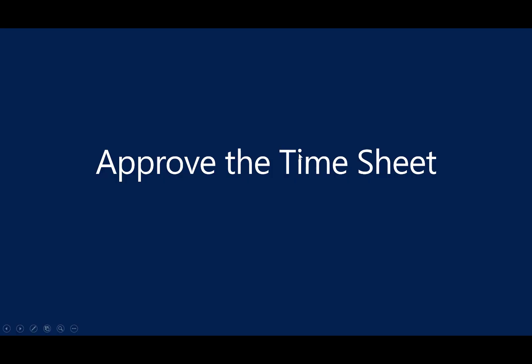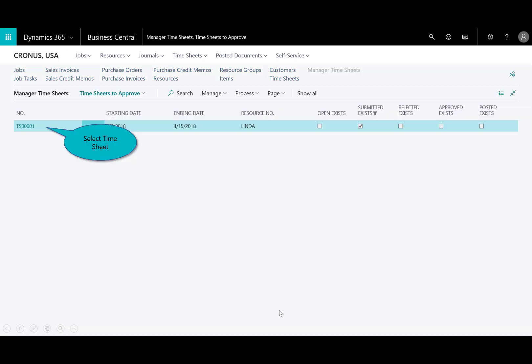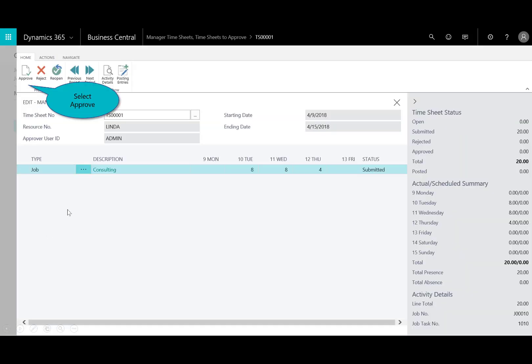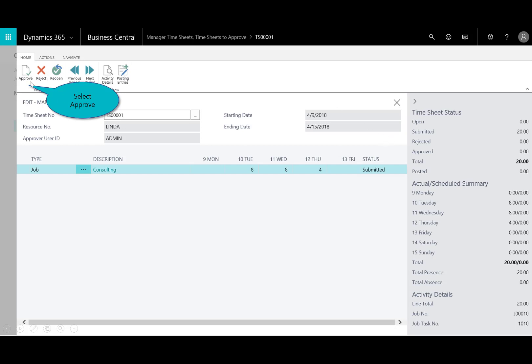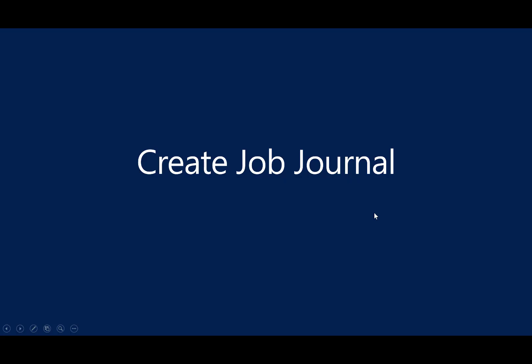Now, let's assume now that my consultant has submitted their time. And so, I want to go ahead and approve the timesheet. So, you'll see here in the tile, I've got one timesheet to approve. I'll open that up. And you can see here again, I'm in the manager timesheets. I look at it. It looks good. I could look on the fact box on the right. Eight hours, eight hours and four. It's been submitted. I'll hit approve. And you see the status has been changed to approve. And that's the steps.